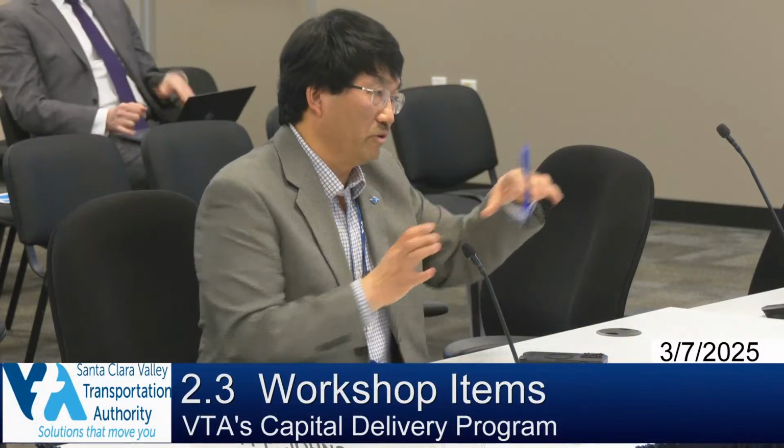We'd have to go back and do a revalidation or something of the environmental document, which showed double for a certain segment between 280 and 87, I think. The rest of it was a single lane, but we could make it so it's a single lane the whole distance. And if it's a single lane, it costs less. It's much faster to implement, and it would generate revenues and provide operational benefits for that corridor. And those revenues could be used for transit and other things in the corridor.